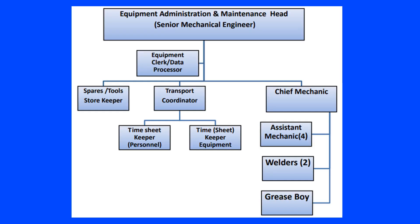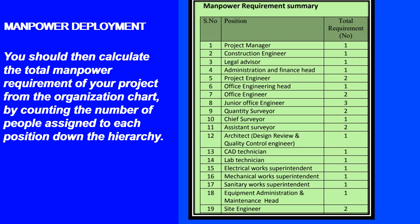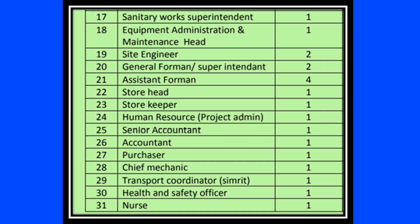You should properly design the project organization chart, starting from the project manager down to unskilled labor. You should then calculate the total manpower requirement from the organization chart by counting the number of people assigned to each position. Remember that all manpower may not necessarily be deployed during the mobilization period — you may request your head office for deployment of prioritized manpower only.